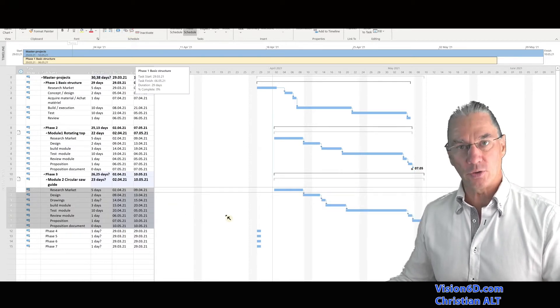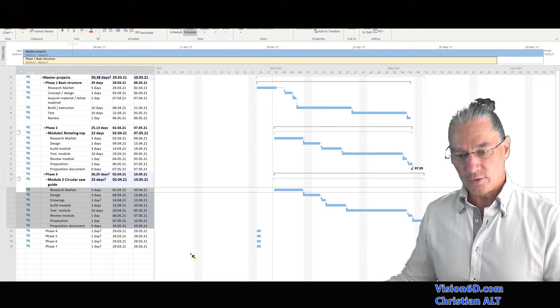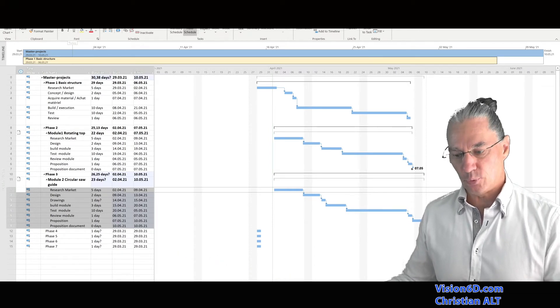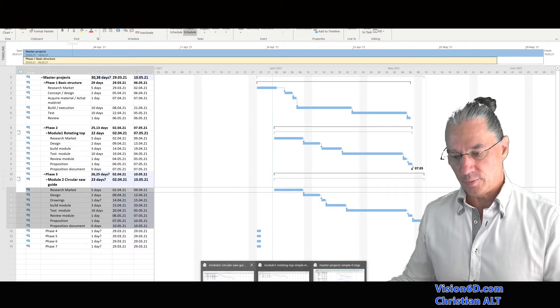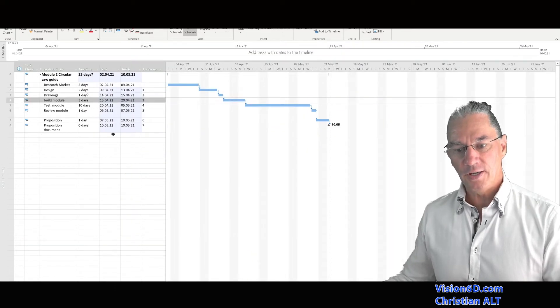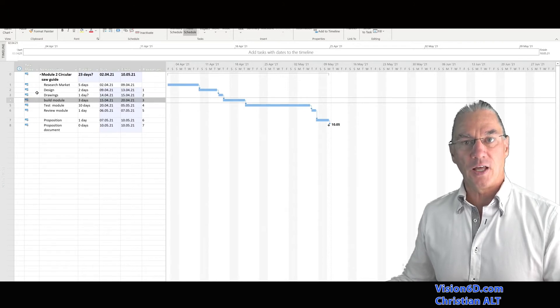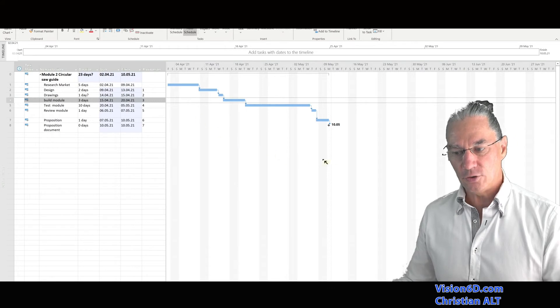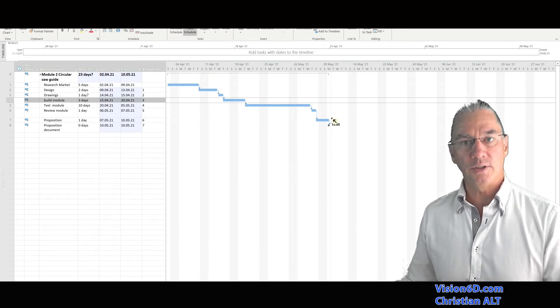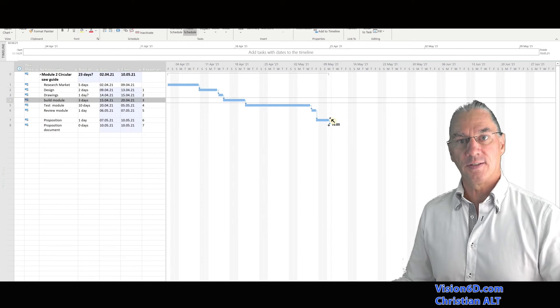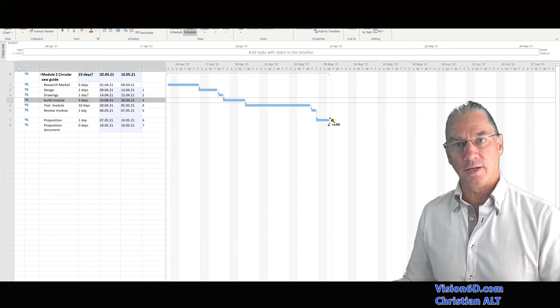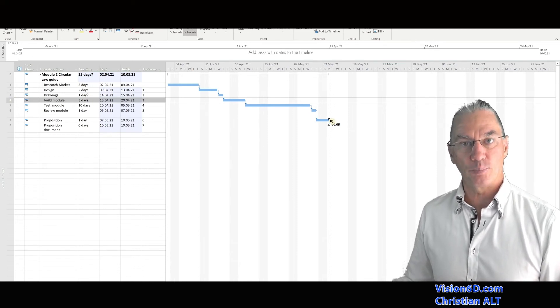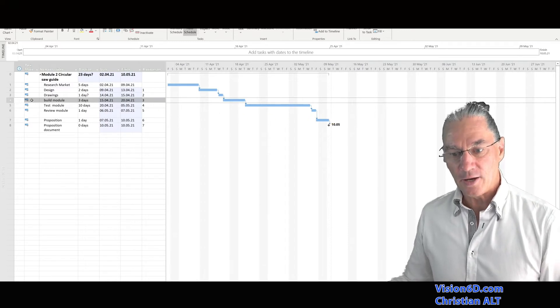And now I'm going to see what happened in the sub-project file. So I'm going into module two here. And you see that the price analysis disappeared as a task. It was deleted. And you see that we have the complete reschedule. So what is deleted in the master file is also deleted in the sub-project file.